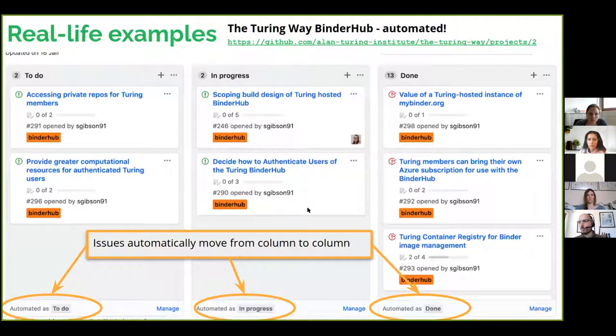In a slightly different way, one of the paradigms in Agile, or a more popular one, if you have used the Kanban style board, where instead of having the versions or the milestones as we mentioned before, you have just the notion of what is to be done, what is in progress, and what is already completed. So this is a simplified version. It's not so focused on the software or versions or specific milestones or goals, but it's more to capture what is actually being actively worked on. And you could do this process within a milestone. So all of the tasks that you now see on the screen could be within one milestone alone.